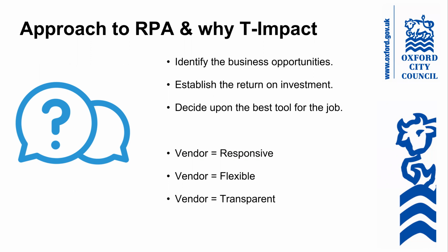So after a long-winded preamble, we went through the digital marketplace, a really good way to sign up with a contract. But we didn't actually procure any software whatsoever in the initial phases. We settled on using the community edition, and we used T-Impact to provide development resource. So that gave us the means to go in with a low cost proof of concept, which would prove to the organization whether the solution worked or not.